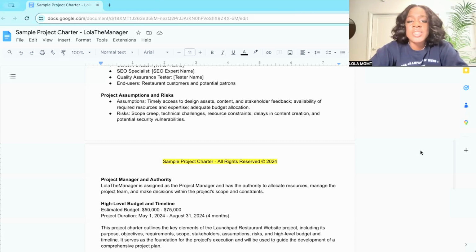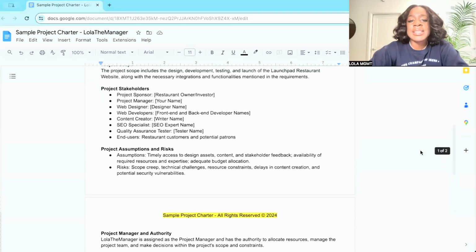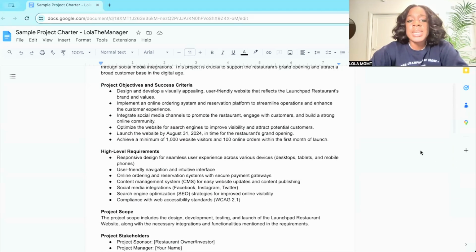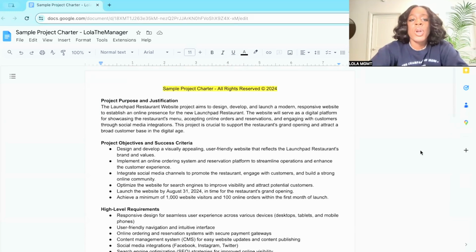So the project charter, as intense as it may look, it's a pretty good reference for what's taking place throughout this project. It serves as the source of truth no matter what's going on. Someone can say, oh, such and such said that we have to do this. Well, is it in alignment with the project charter? If not, we're not getting it done. So I hope that this was helpful. Let's make it back to the main video.